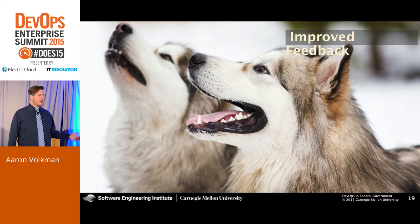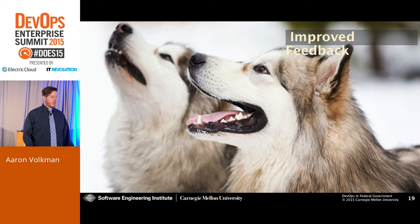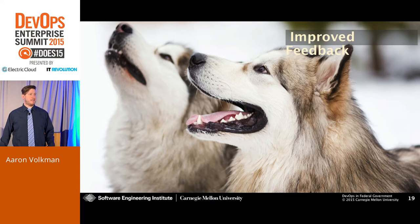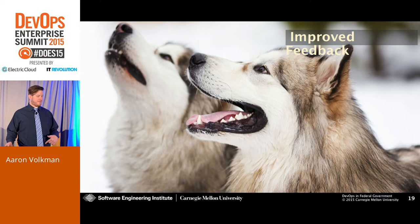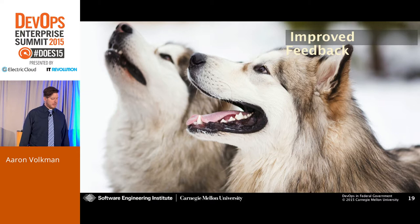The documentation server that I described was very beneficial, where the customer had a direct line into our line of thinking. We also gave them access to our issue trackers and to our wikis so that we had complete transparency of the status of our projects and what was going on, so that they would be aware of any incident like what happened before where we went over budget and over schedule.